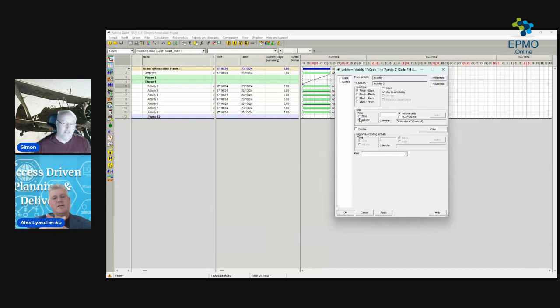I like that. That takes away a lot of problems that I have in scheduling, where someone can be halfway finished a job, right? And you've got to manually put the lag in, like you've got to do a negative lag to get that happening in MS Project. But it's a manual thing. You'd have to talk to the guy and say, hey, when can this guy start? And he'll say, oh, probably at this point of my task, he could start. So it'd be manual. This looks like it's just like, tell me how much is done, and now we'll trigger the next task.